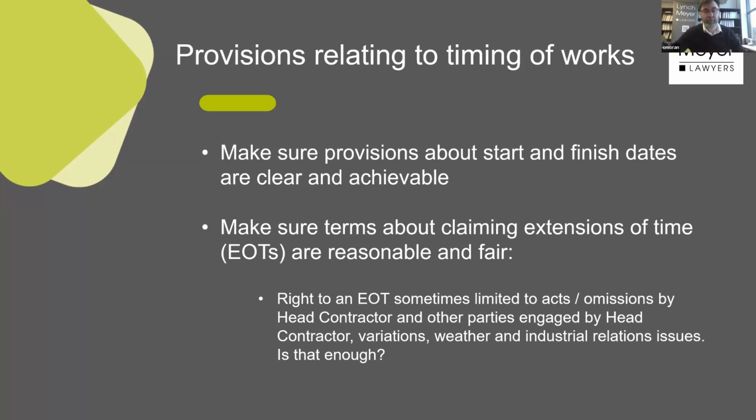And so, look, I won't go through the sort of things that you guys will know as much as I will about what things might delay. Of course, if you subcontract certain work and they cause delays, often the principal or the builder who engages you will say you have to wear that risk. If you want to get some protection in relation to your subcontractors, you've got to build that into your contracts with your, let's call them, subcontractors. But anyway, you'll see there'll be a section that says you're entitled to extensions of time because X, Y, and Z. Look into that part of the contract and see if you can add anything more to broaden that as much as possible.